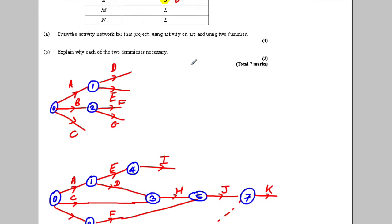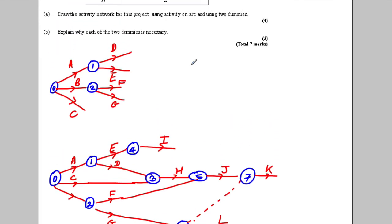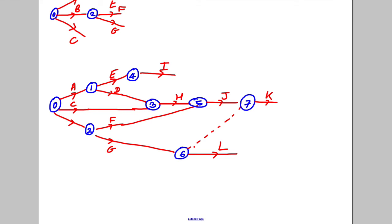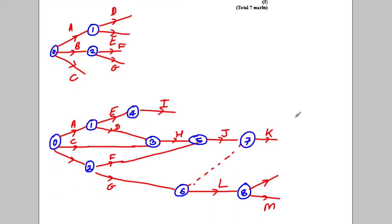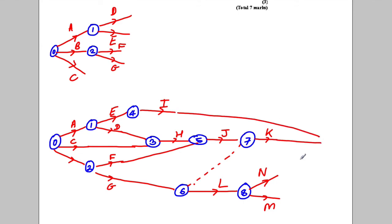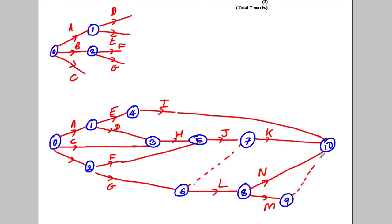M and N both depend on L finishing. So I close off L at node eight and have M and N coming out. Now I, K, N and M are all unattached, so they all go to the final sink node. Since M and N both start at eight, I close one off at node nine and the other at node ten, with N going into the final node via a dummy.